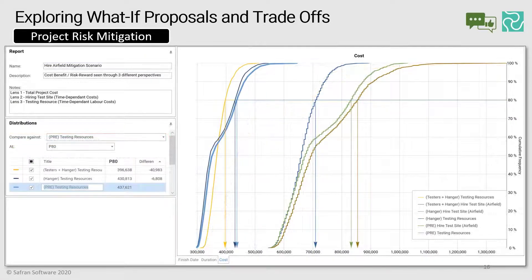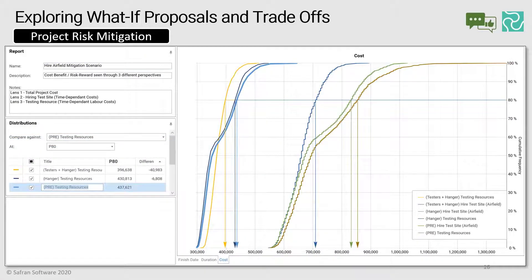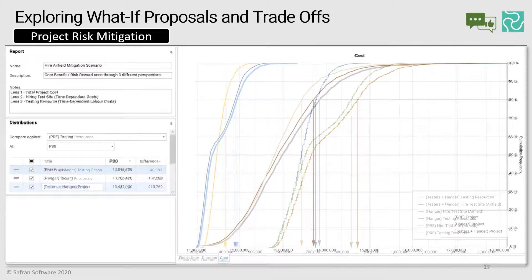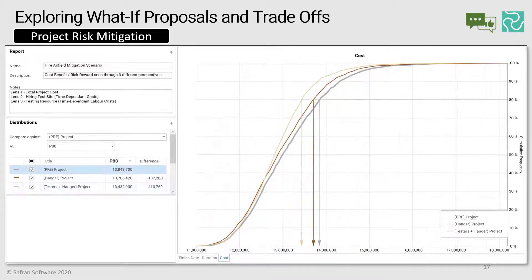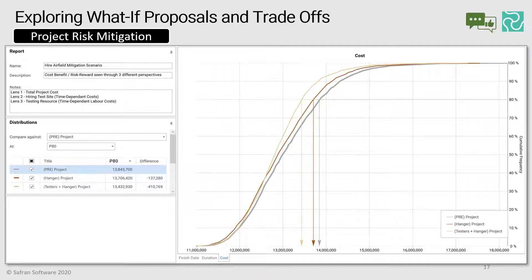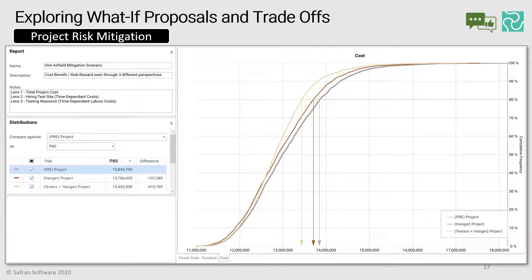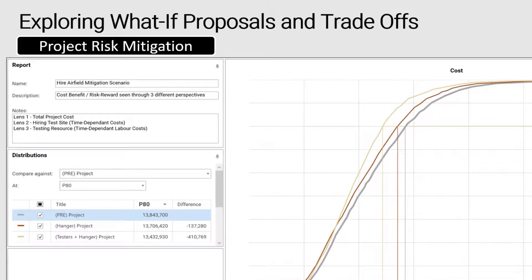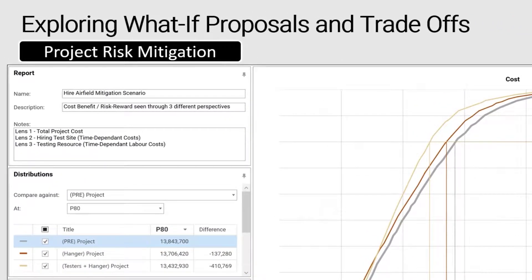The second perspective might be, well, that was just the cost of hiring the airfield, but what about the labour costs associated with the original testing team themselves? So we can actually layer in some more curves and save as many as you like within the database. So now we're showing both the airfield hire costs, but also the labour costs, which are also time dependent. This then leads to a logical third perspective, a top-down view that merges all those curves together to see the combined cost savings being proposed. Again, the table on the left-hand side, we can see that the net benefit is going to be 410,000 combined.